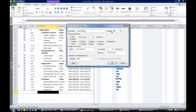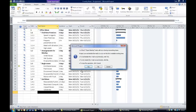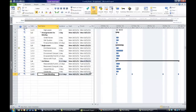Change the duration from one day to one hour. The recurrence pattern is weekly, recurring every one week, which is already selected. Set it to occur on Monday and end after five occurrences — that's five weeks. So: team meeting, one hour duration, weekly on Monday, every one week, after five occurrences. Hit OK and confirm yes to the prompt.